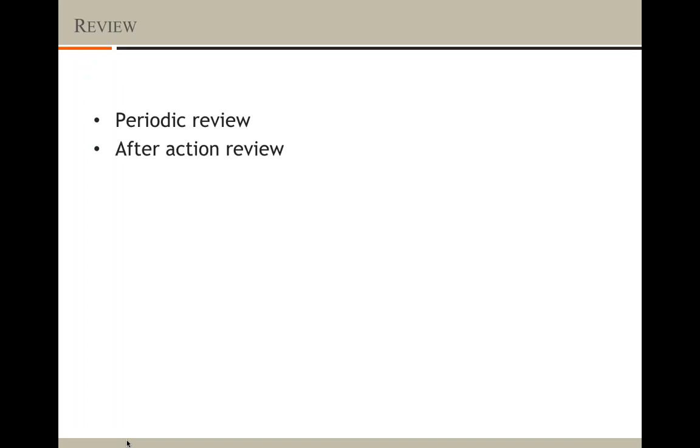Ask yourself and your team questions like these and record the answers. This will really help you get better in understanding what worked and what did not work. Has reaching the goals produced the payoff that you and your team anticipated? If we had to do this again, what could we do differently? Was the team given sufficient resources and authority to do the job well? What lessons from this task can be carried over to future tasks to make them faster, better, less expensive? These are just examples of questions you can ask. This will help you get better the next time.